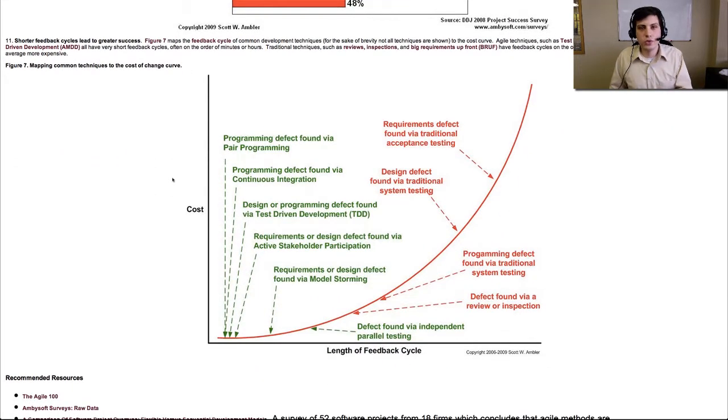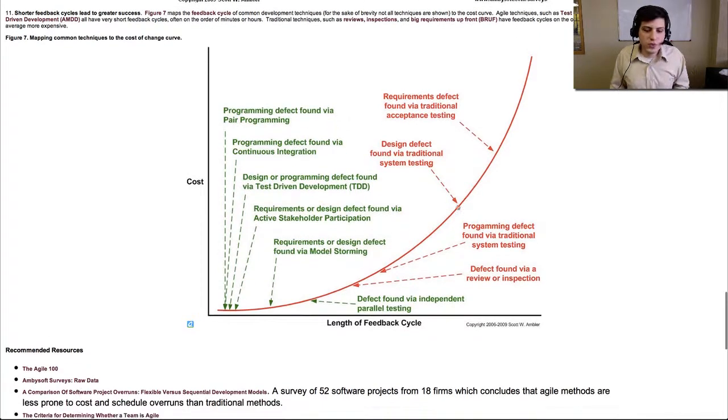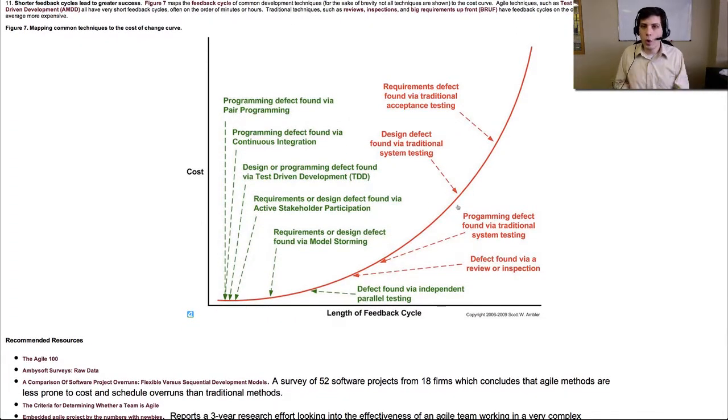And then thinking through the cost of change. We end up changing our minds and our product many times throughout the iterative process, but if we've committed to everything rather than small changes, the cost of change goes up a lot, exponentially, which is why this growth curve is an exponential curve. So hopefully this makes a lot of sense in terms of why we do what we do and why we communicate the way in which we do through video, through daily stand-ups, those kinds of things.